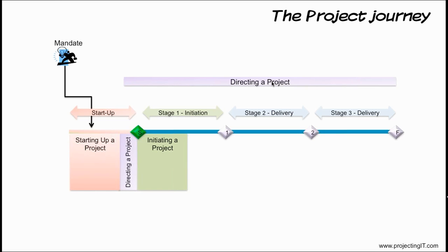Controls are created for escalation and reporting, and also about how changes will be managed and controlled. How the documentation will be version controlled and securely stored is also defined as part of initiation. And finally, how communication takes place during the project is also described. All of this goes into the PID. A benefits review plan is created to describe how the project benefits will be confirmed, measured, when and by whom.